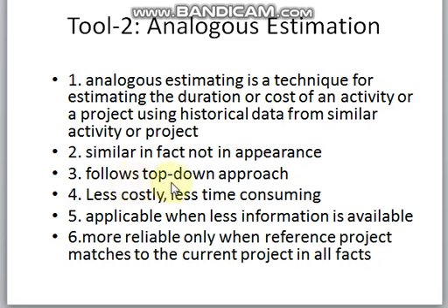So next, it follows the top-down approach. Because it follows the top-down approach, it is less costly and less time consuming. It is applicable when less information is available, and it is more reliable when we take a reference project or reference activities, and if those activities which come from the historical projects match the current activities, then analogous estimation will provide a reasonable degree of satisfaction or confidence in the current estimation process.